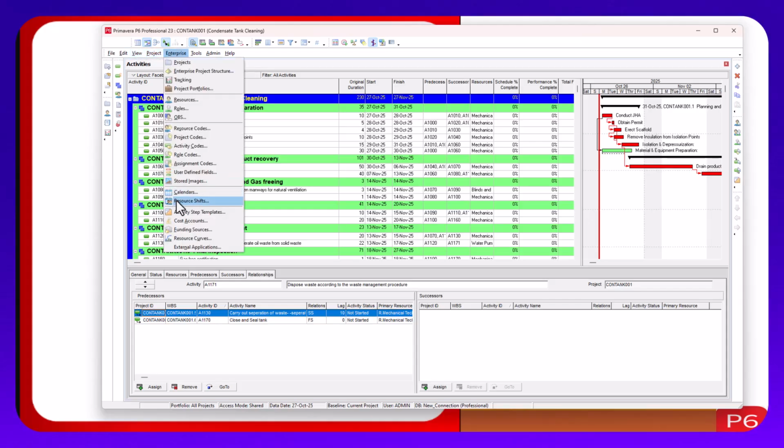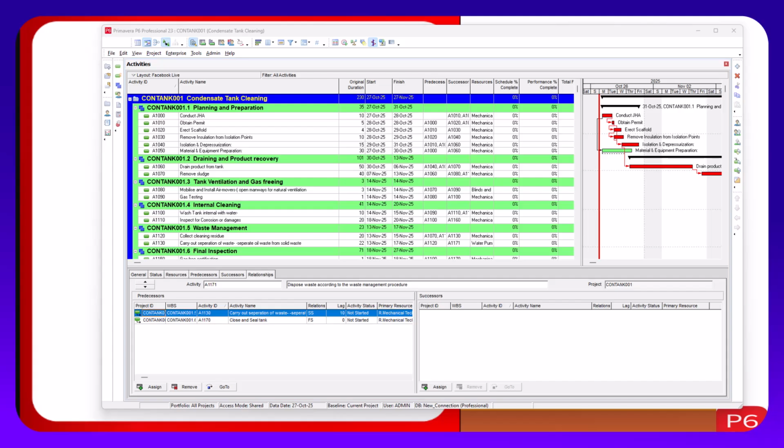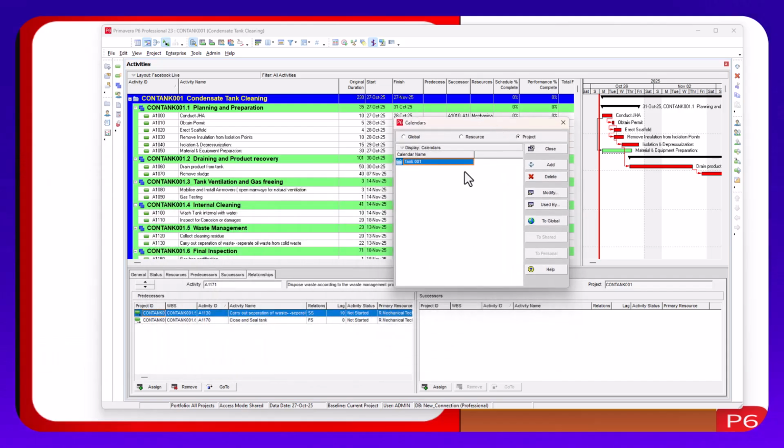So let's go back and rename that calendar like I'm mentioning now. We want to rename it to show exactly what it is, so that even a novice that opens this and gets to this place can tell. Yes, it's showing that this calendar belongs to TAN 001, right? But it doesn't tell us much about the type of calendar it is, the information the calendar should convey. So you need to name it clearly, like 5-day work week, 6-day work week, 12-hour shift calendar, shutdown calendar, and all of that.